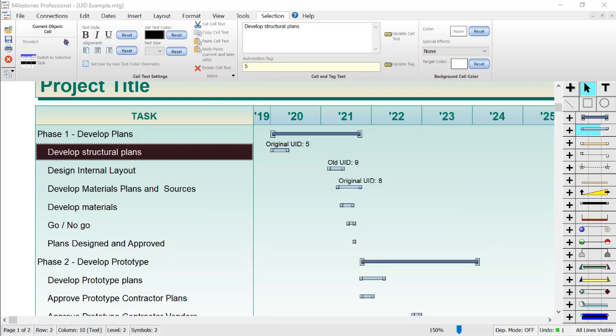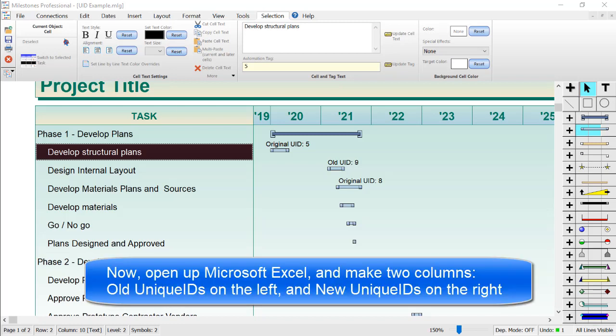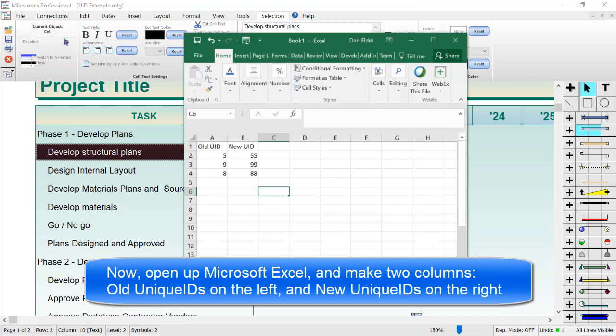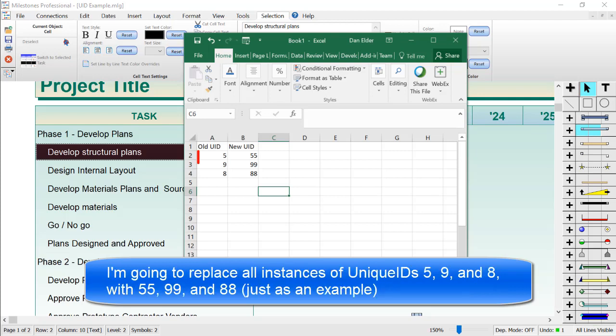Now I'm going to go to Microsoft Excel. Inside Excel, you will need to enter or copy your unique IDs into two separate columns. The column on the left will be the old unique IDs, and the column on the right will be the new unique IDs. For example, I will put the current unique IDs 5, 9, and 8 on the left and replace them with unique IDs 55, 99, and 88 on the right, just as an example.